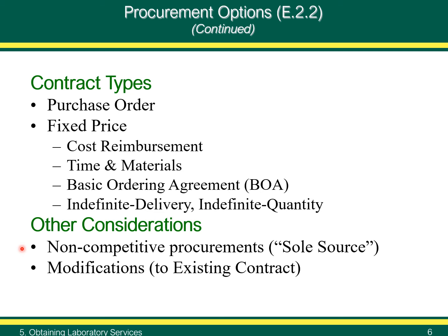The non-competitive procurement process is used to establish qualifications, capabilities, costs, capacities, and other requirements. Federal acquisition regulations specify procedures and justifications for limited competition in FAR Section 6.302. Lack of funding or inadequate advanced planning, for example, are insufficient justifications. Generally, there must be an unusual or compelling urgency to use a non-competitive process.